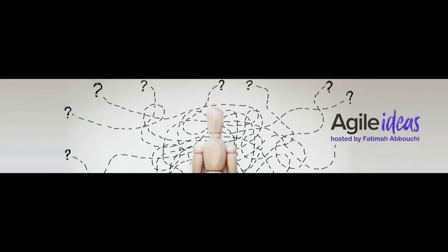So tracking lessons along the way and sharing them with others in the team, and asking those people in your team to actually review and see whether they've experienced the same challenges is a really, really helpful thing, because you might have actually learned a lesson that already existed, and therefore you might be able to use the context of both those perspectives and opinions to modify the lesson so that other people can learn from it.